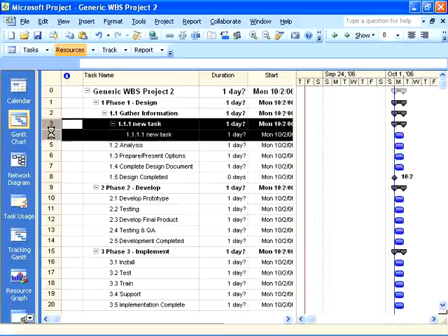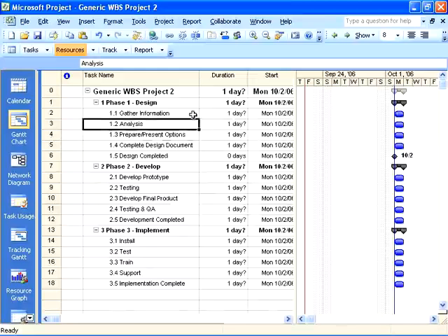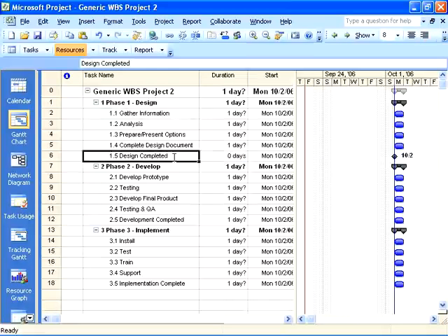I'm going to remove those by hitting the delete button now, but I wanted to make sure you understand the difference. Microsoft Project differentiates between phases and tasks based on the fact that there's something indented underneath it. If there's nothing indented underneath a particular line item, then it's in effect a task. But I've also talked earlier about differentiating between a task and a milestone, and we know that by taking this particular activity and making the duration 0, Microsoft automatically recognizes that as a milestone.